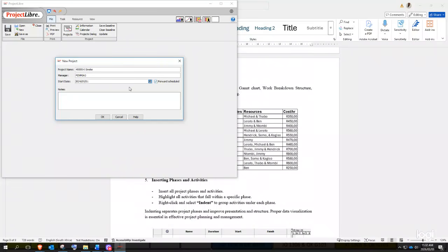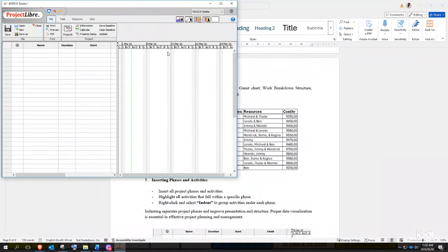But if you don't change this, by default you saw the year was 2026. Then that would mean for each task you will have to thoroughly check if the year is correct. So we don't want any room for errors. That's why we have to change this and insert the first start date of your first activity and your first task. Then you click OK.